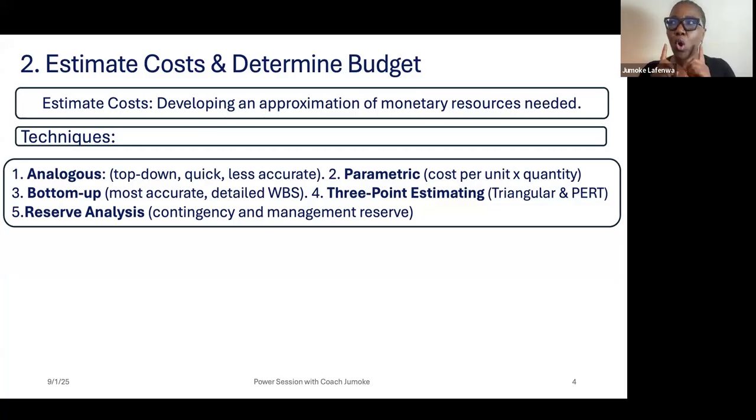It's okay, we will call the Ghana Fire Service. I said, okay, so how much is it when you invite the Ghana Fire Service? They will charge 10,000 Ghana cedi. So you make provision of that 10,000 Ghana cedi. You add it to the budget of your project. So that will be part of the project cost baseline.